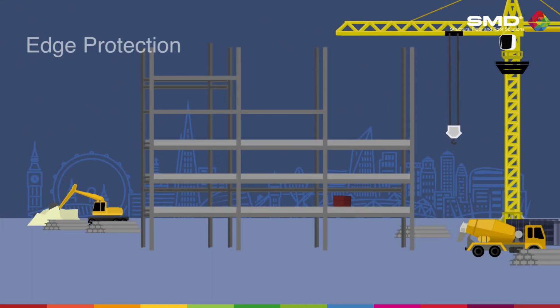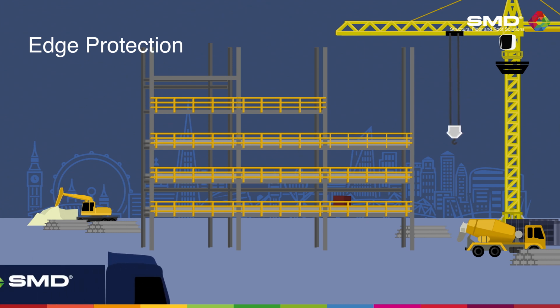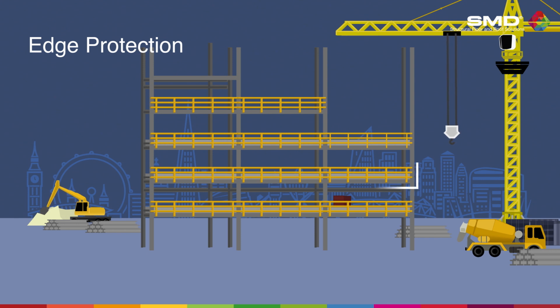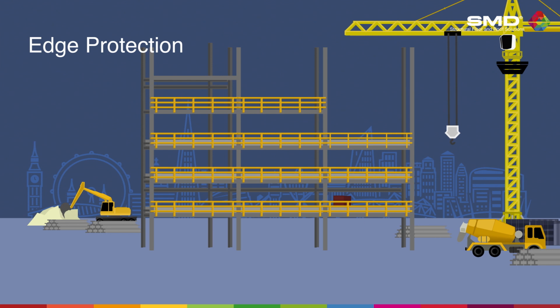Edge protection must be planned and fully installed in the relevant areas prior to SMD commencing on site. The handrail system must be designed and installed to the correct standards, and any potential clashes with our works have been considered.